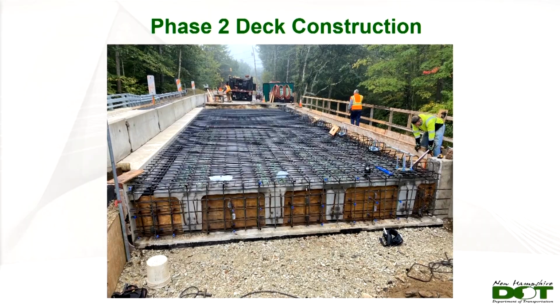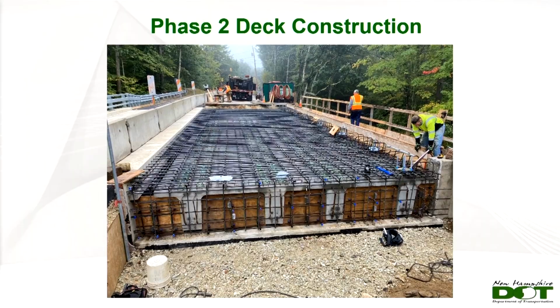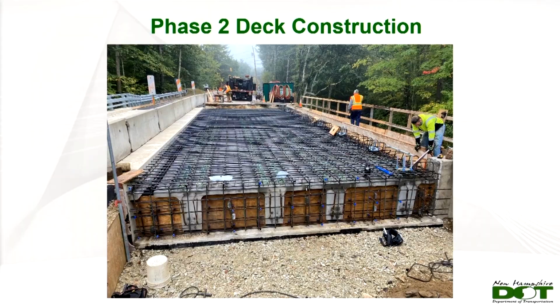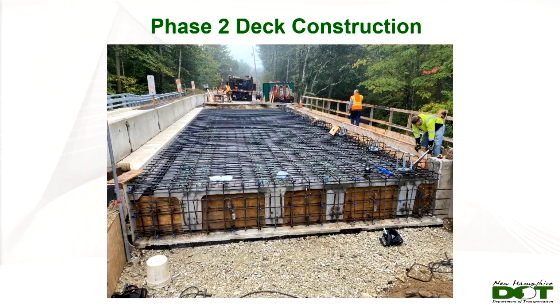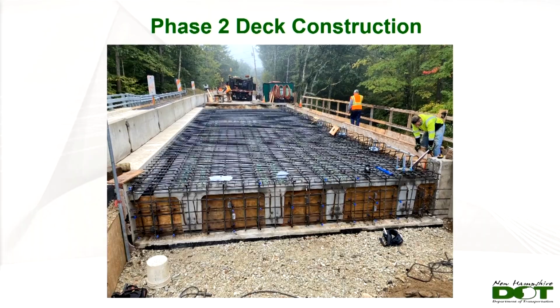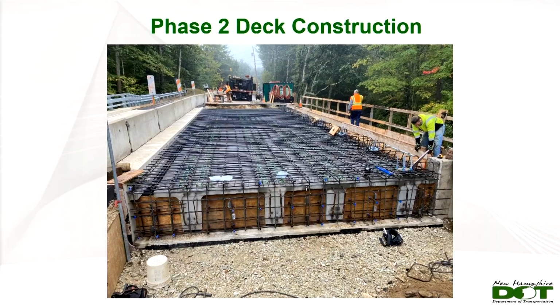One thing that's a pretty common bridge phasing issue that shows up in most projects, but in particular with next beams or pre-stressed beams, is differences in deflections creeping between phases because of the continued stresses being incorporated into the beams. That's something that on our capital projects they've seen, especially on bridges with larger skews. Luckily here we had zero to minimal. There was really almost a 0 degree skew.